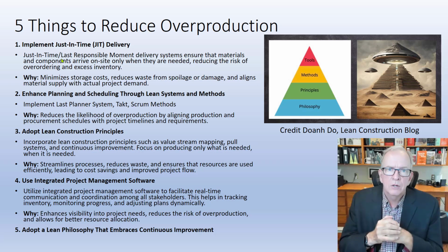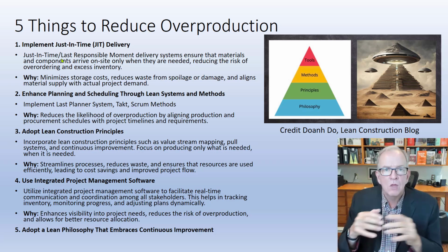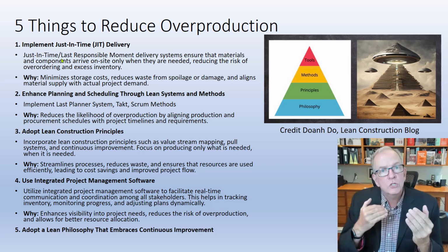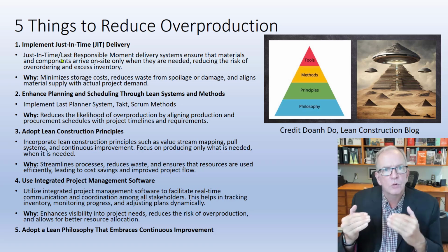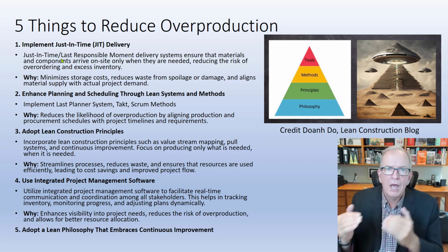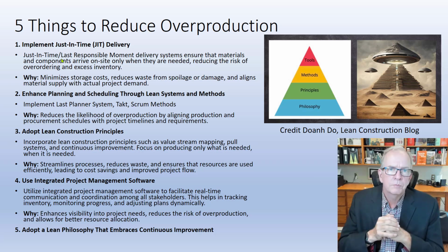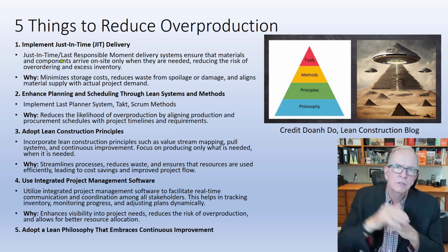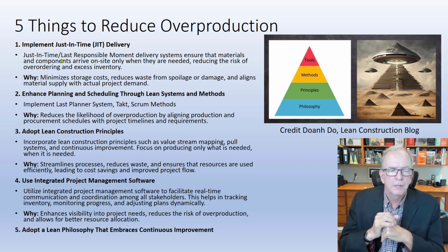Or was it better to have maybe 2 or 3 batches of them delivered over time and not take up as much space? Is there an issue? Maybe there's an issue with the dye lots and the coloring of the stone. So from that perspective, that risk overrode the risk of having it in separate deliveries. Those are things you have to consider with those particular areas. Things like bricks may have some aspects to consider. But that particular property has 3 areas that the stones were going into, so they could have been separated out pretty well. I think that wouldn't have been a problem.